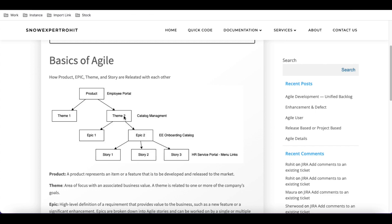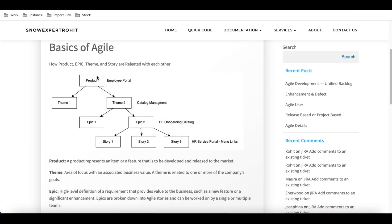We also have another role called scrum master. The scrum master has access at the epic level — they can modify epics and stories. Similarly, the scrum team member has access at the story level and can modify and update stories. The scrum user has read-only access to all these modules and cannot modify or edit anything.